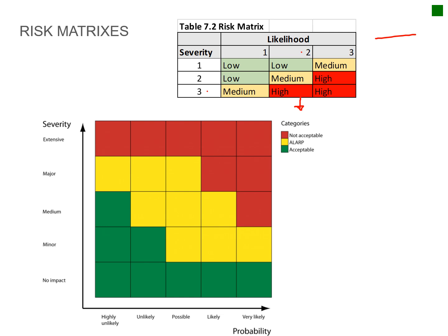It might even be a 3, which will also highlight it as a high, but because it is quite a severe incident, even if the likelihood of it is quite low, you will still sit with a medium high risk. So that's the thought process that one goes through in identifying the risk priorities on site.